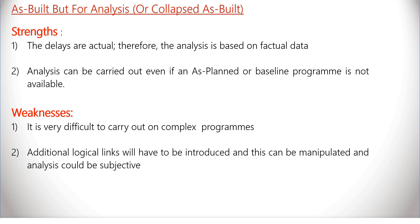Second, additional logical links will have to be introduced and this can be manipulated and the analysis could become subjective.